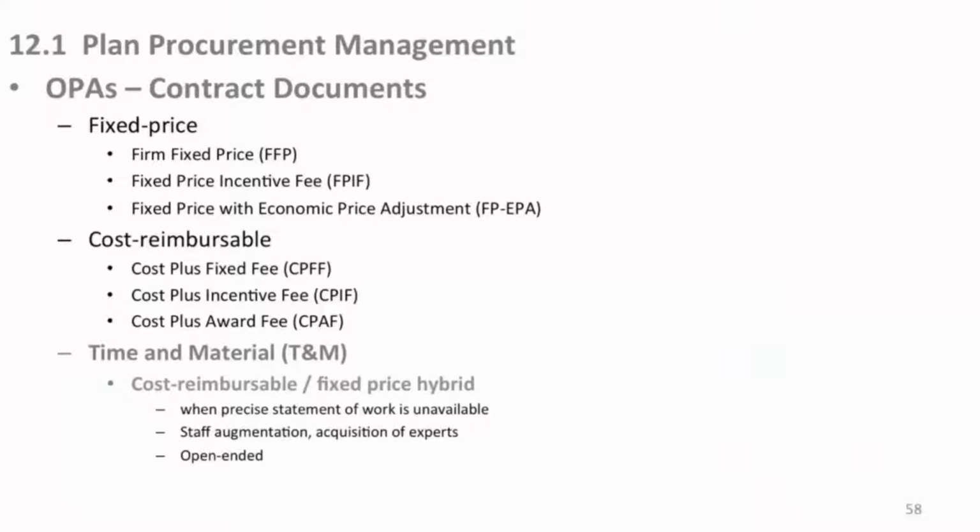But it's also used when the statement of work is not precise. You want your procurement statement of work to be as tight as you can so that your supplier can build or provide exactly what you need. When you have a less clear statement of work, you would use this type of contract because for some part of it you'll know, here's the money we're going to spend for these things, but for the rest, let us know what it's going to cost, and then we may pay you extra for that. Some things you just don't know in advance until you actually start to design it and build it.